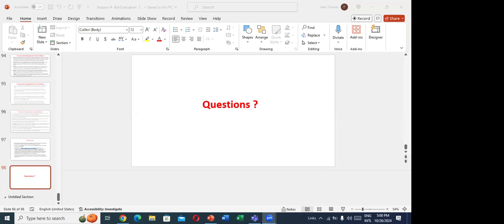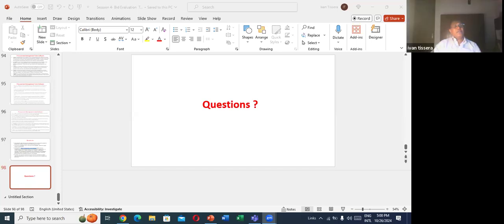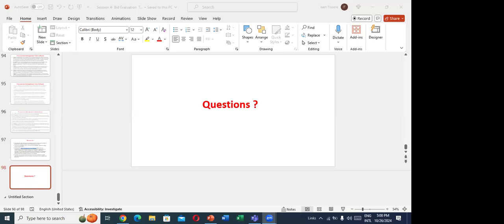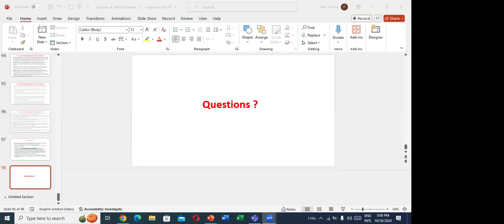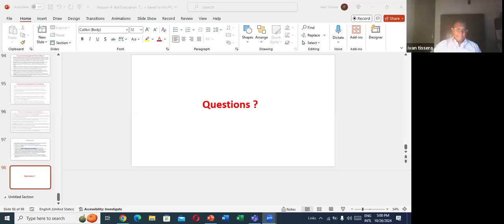In the contract agreement, we give the order of merit of the documents, what is binding, 1, 2, 3, 4, and where the BOQ and the various other documents come. Whatever it is, the contract agreement is the binding document, the first one. Okay, sir. Thank you so much.